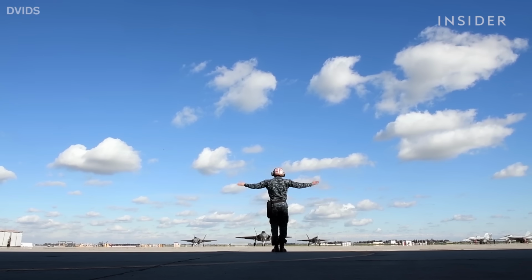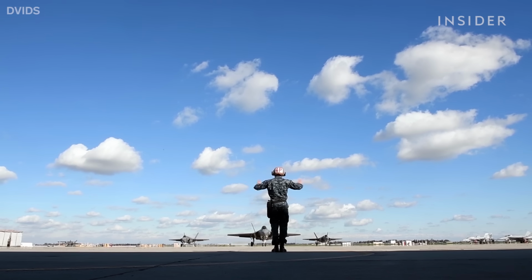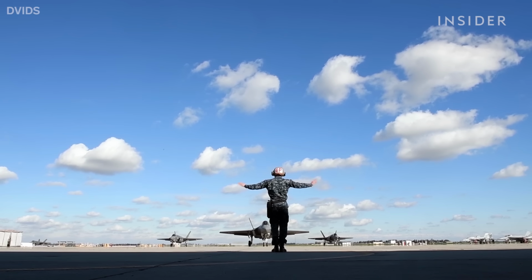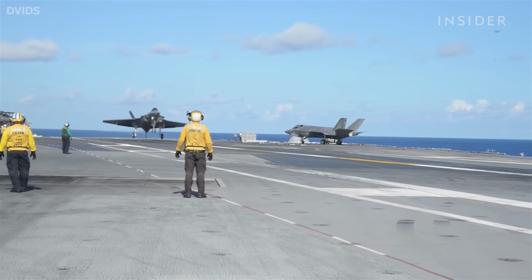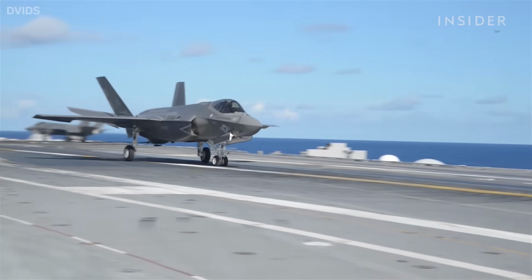And because all 3 airplanes were being developed together, it also resulted in some redesign of the A model and the C model. This was a major setback to the program and ended up costing the program a lot of time and an awful lot of money to redesign. The Navy's C model needed tougher landing gear and bigger wings so it could land on a traditional aircraft carrier.